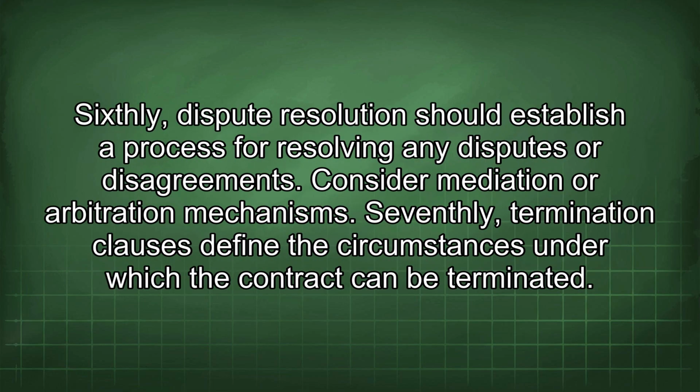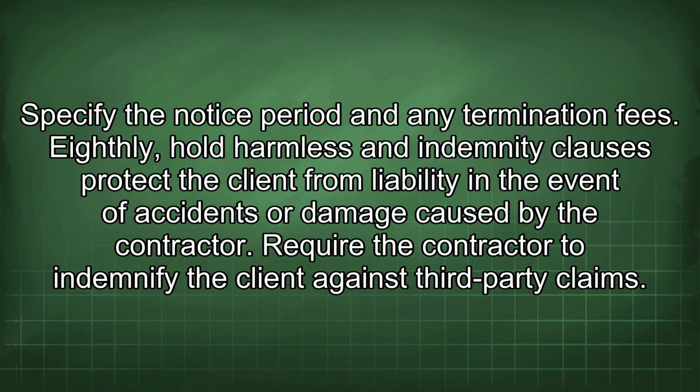Sixthly, dispute resolution should establish a process for resolving any disputes or disagreements. Consider mediation or arbitration mechanisms. Seventhly, termination clauses define the circumstances under which the contract can be terminated. Specify the notice period and any termination fees.